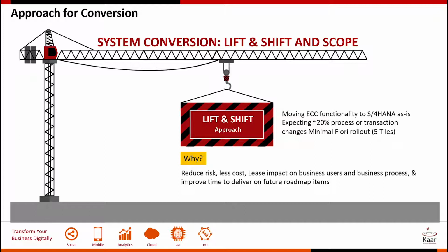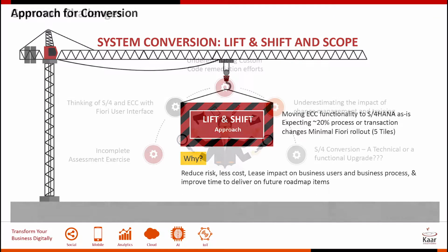So do the minimal changes, take only those transactions that can be done only by Fiori, Fioriize them, and then you're able to deliver this project to the customers. The business end users don't see a lot of impact here. You would expect about 20% process or transaction changes if you do it in this approach. But if you also want to include all the redesigning, remodeling, and changing your business processes, you should do that post stabilization after go live.